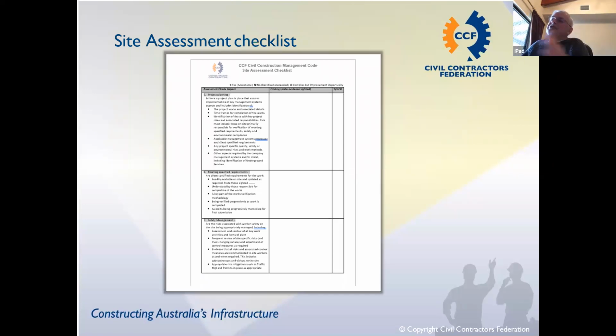So we've got an ITP plan. You know, for larger jobs, you'll have an ITP plan. For smaller jobs, it might be, I've just got to do 2 tests on this particular trench that I'm doing, or the client's got to come and visually witness something. So somewhere in that plan, it's got to be stated, so nobody is just guessing.